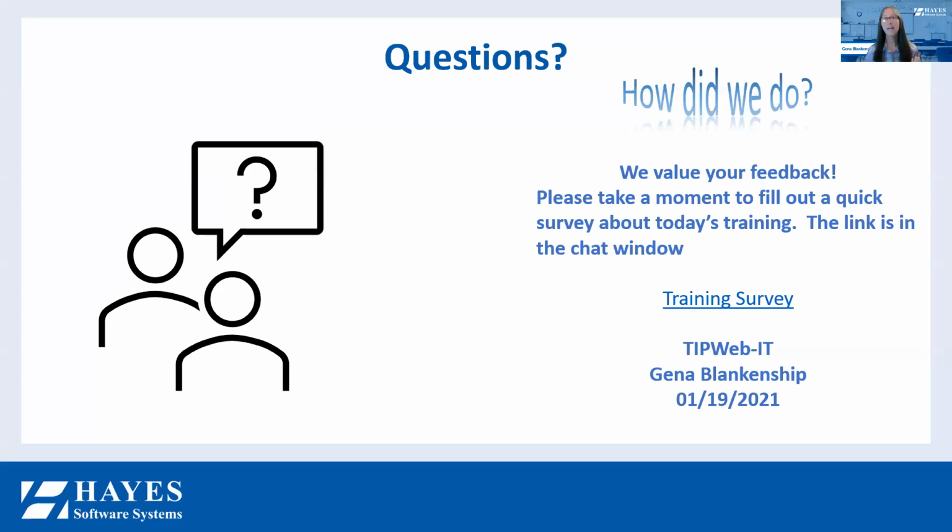So then the question that I added to the end: what should I know about what needs to be done prior to an audit? Now I'm referring specifically to inside the system. The number one thing that I think you should remember about site audits is that an asset can only reside in one audit at any given time.